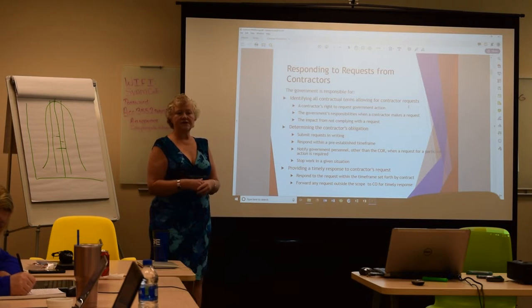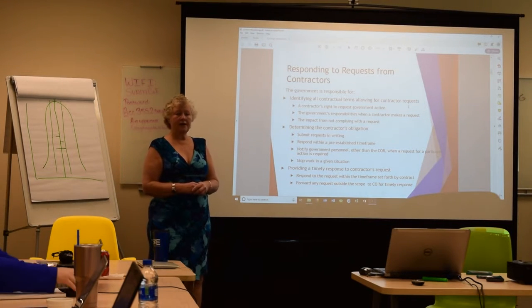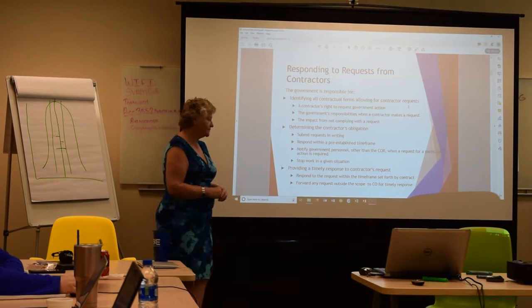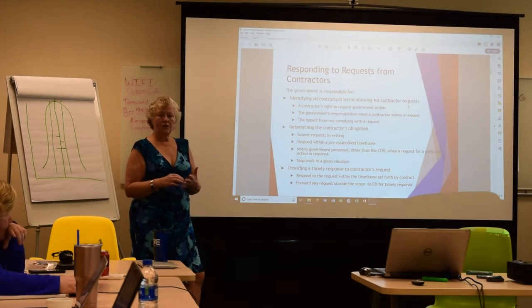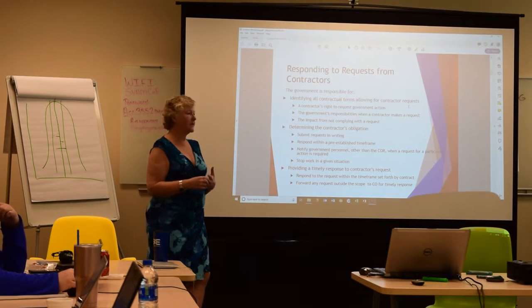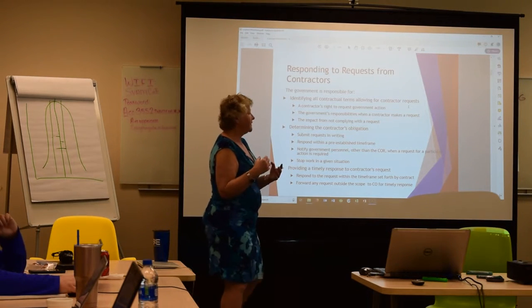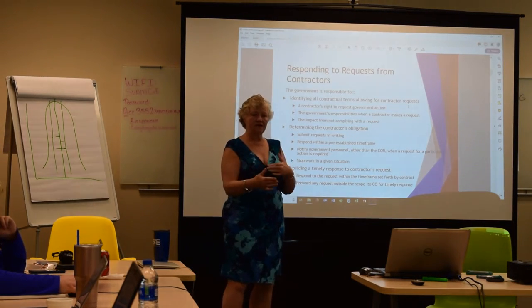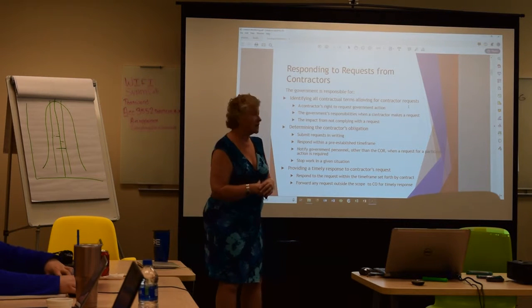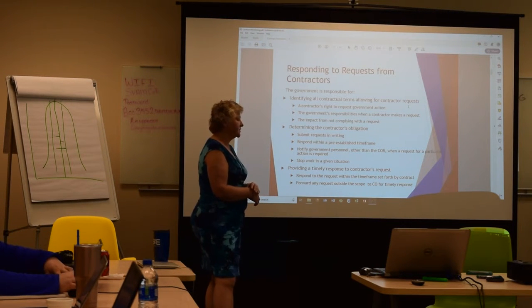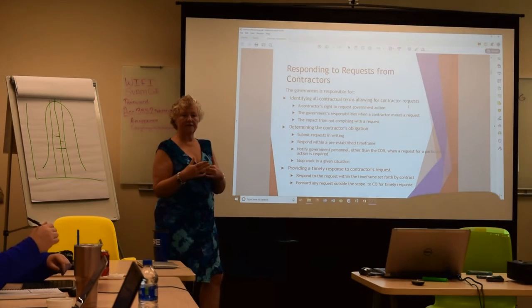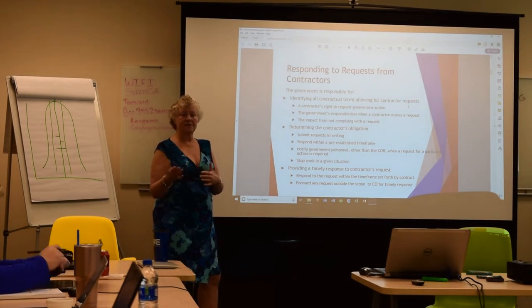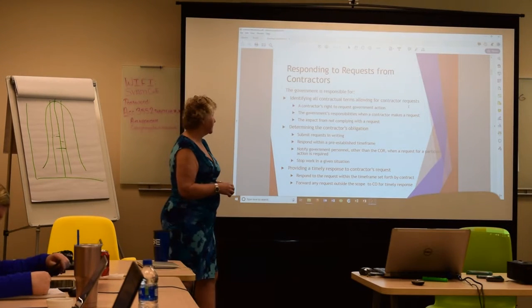So we had a discussion yesterday about government furnished property. And we said that if the government provides the property late or broken or whatever the other issues are, then again that can cause the contractor to have a delay, and that's something the COR needs to report. And they also have to report the impact of the fact that the government was delayed. So in this case, it may be a delay in the production cycle.